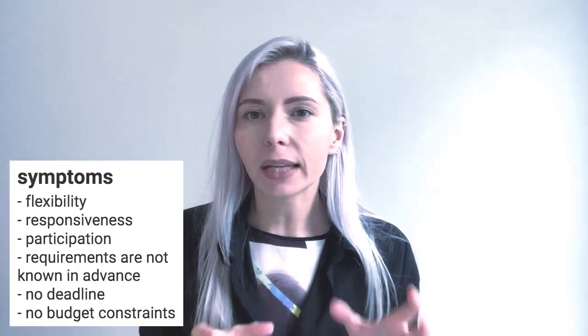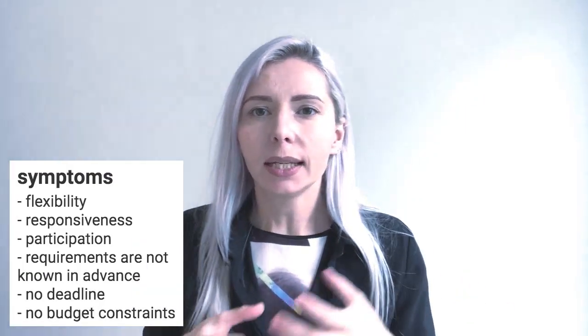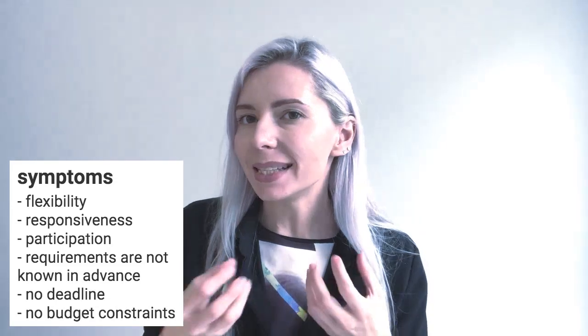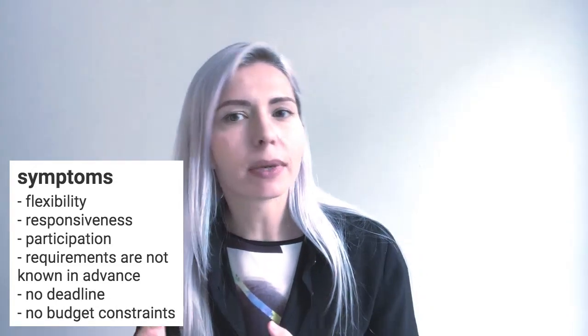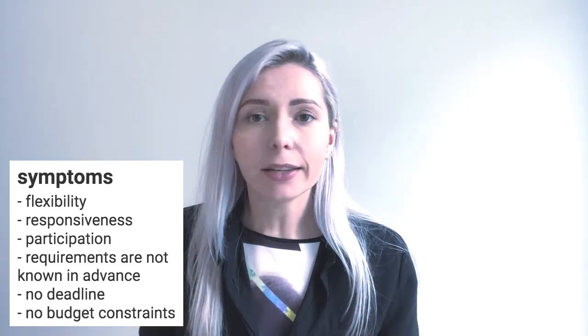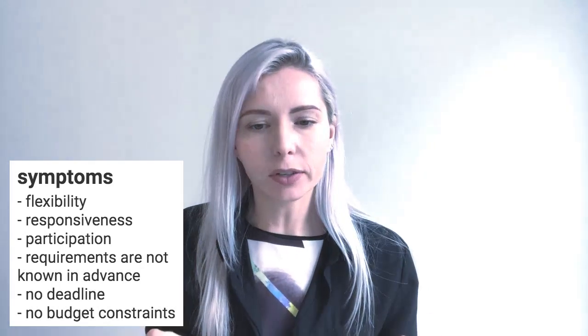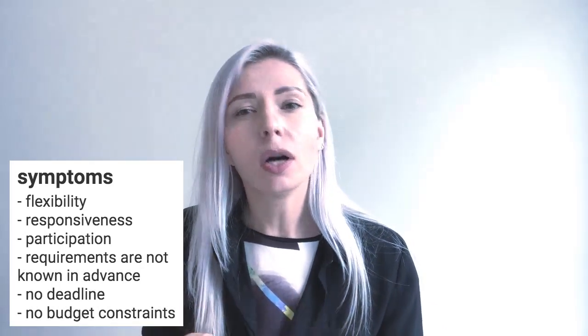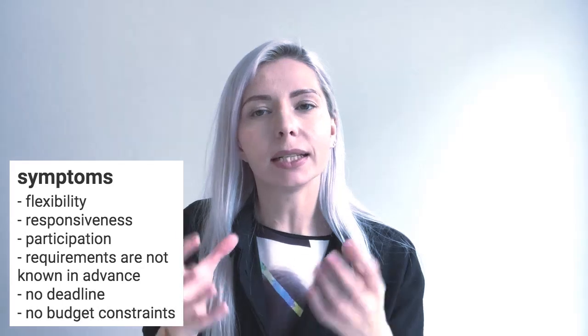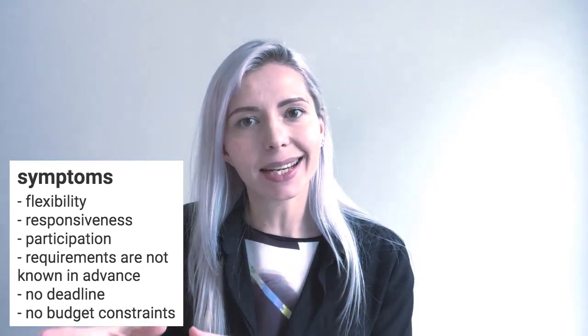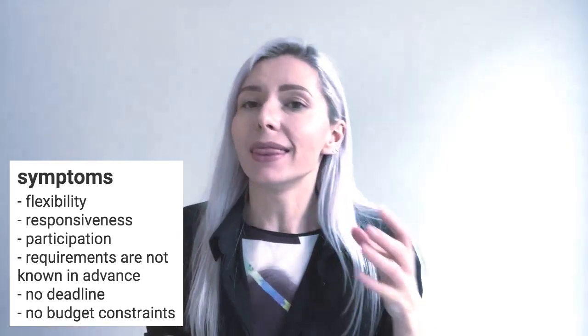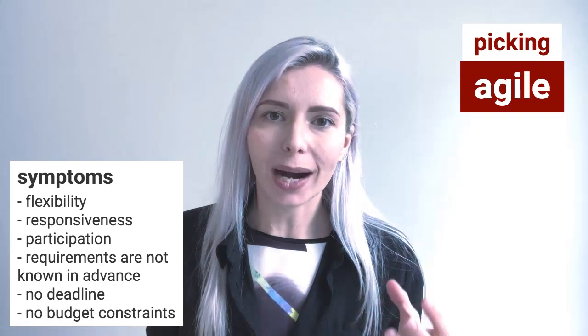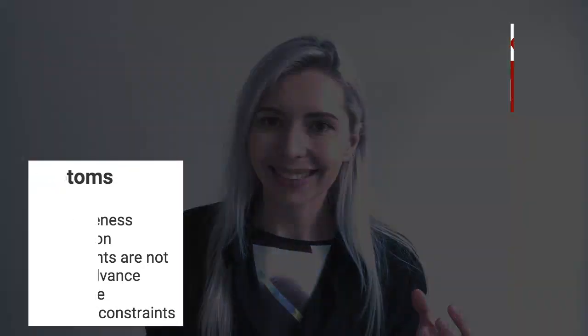Another situation is when the customer is pretty flexible about the budget, he doesn't know all the requirements in advance and he is always changing his mind. So he is very responsive and wants to participate in the delivery process, and also the final product is more important than the deadlines or budget. This is when we are taking one of the agile frameworks.